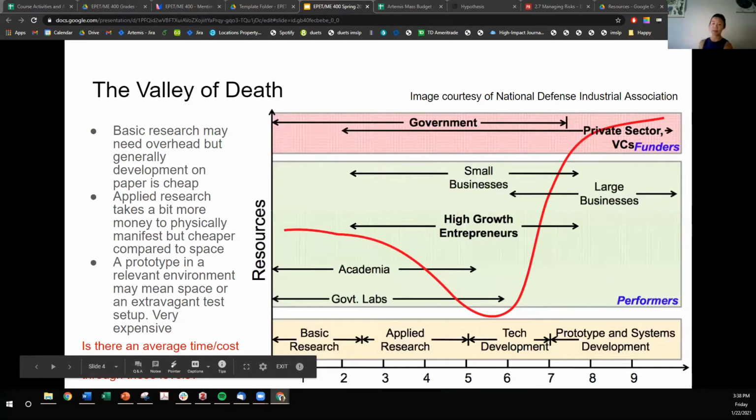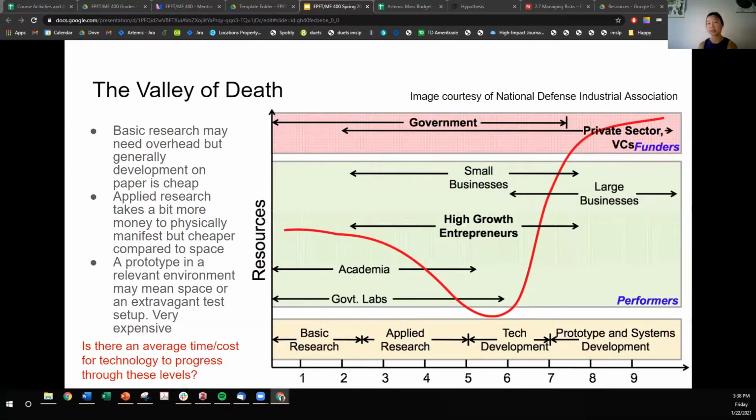So I have a couple of perspectives from engineers at different phases in industry and also in academia. So here's a senior engineer at Boeing. He says, for many in the research and development community, a technology is generally proven when it reaches technology readiness level 6, at which point it has achieved system, subsystem model, or prototype demonstration in a relevant environment.